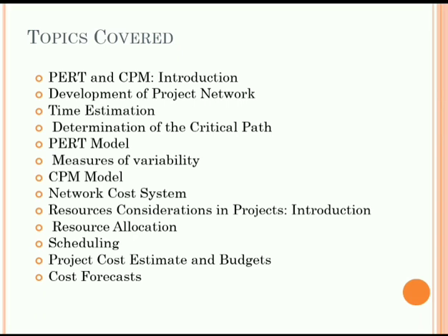This stage confirms the availability of human resources and obtains the team necessary to complete the project activities. The input for this stage is the output from the previous step, the human resource management plan, which is taken as an input for acquiring the project team, while the output here will be project staff assignments, resource calendars and project management plan updates.